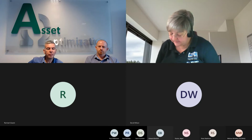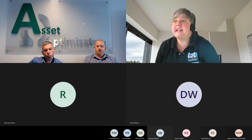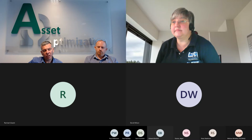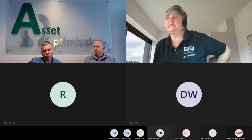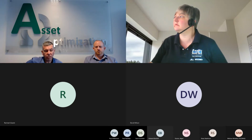I've got a question regarding data. Does everybody always have the correct data that you need? How much data is required to implement one of these projects? It's very rare that you find all the data in one place quite conveniently. It's very often that you've got to do some mining, shine the light in people's eyes, or even go and look at your local PI systems and your local data systems to find out a little bit more information. Sometimes it's worth actually going on site, doing some site verification, looking at pressure vessels and their identification on site itself.